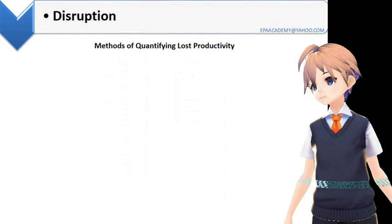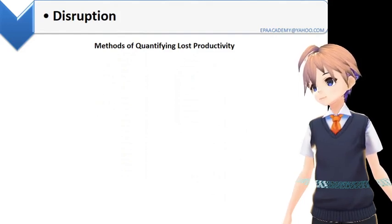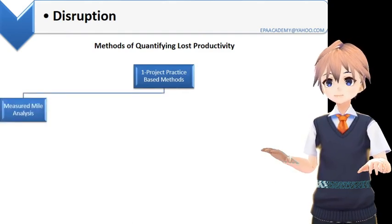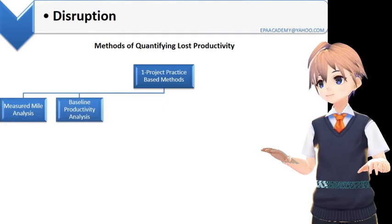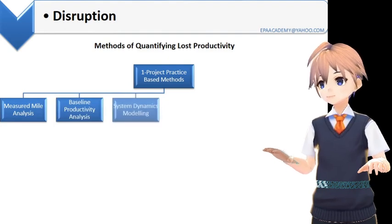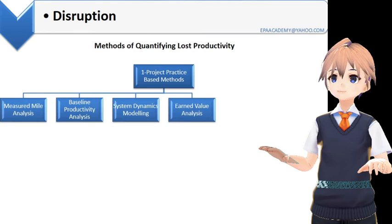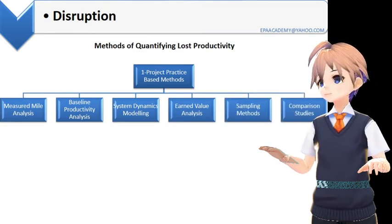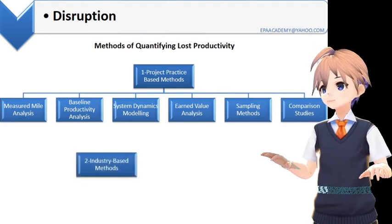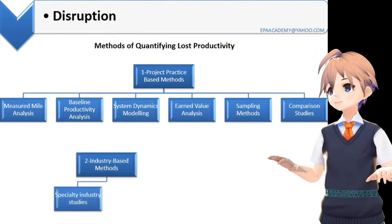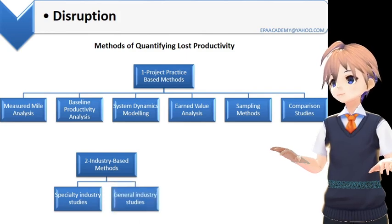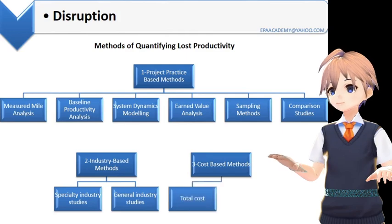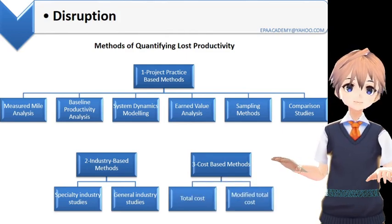Methods of quantifying lost productivity fall into three groups. First, project practice-based methods: measured mile analysis, baseline productivity analysis, system dynamics modeling, earned value analysis, sampling methods, and comparison studies. Second, industry-based methods: specialty industry studies and general industry studies. Third, cost-based methods: total cost and modified total cost.